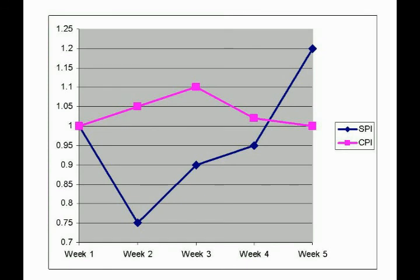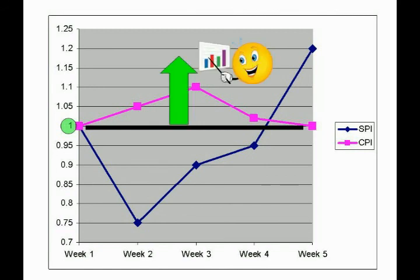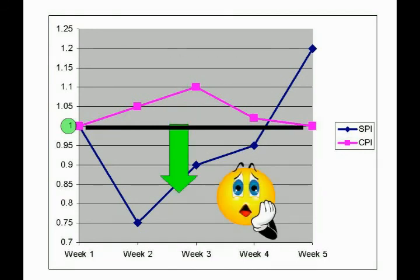The concept to take away is that to get a snapshot of a project's status, an index value of 1 indicates right on schedule and budget. Greater than 1 is good — it means more value has been created than planned, or that value was earned ahead of schedule. A value of less than 1 means behind schedule or over cost.